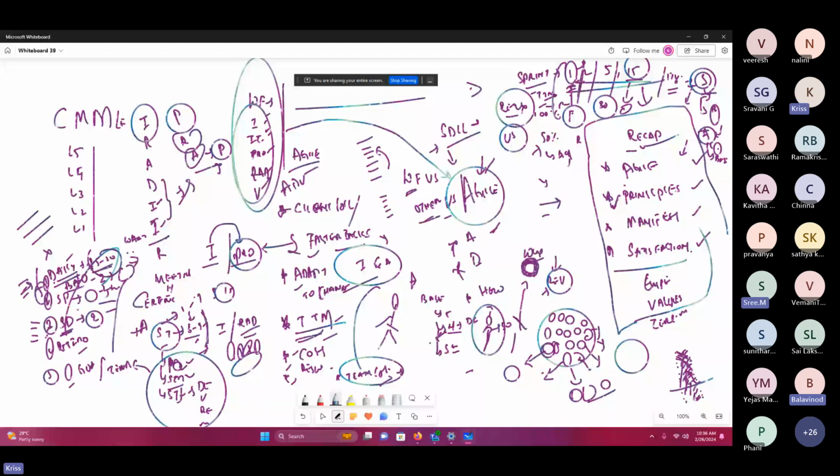Internally, the daily ceremonies, the backlog refinements, or sprint planning cover what user stories we need to pick for this sprint, what things we need to achieve, and by when we need to complete them. These all come under sprint planning. In the sprint demonstration, we show the things which we have achieved. We do that demonstration for the entire world, where everyone can attend: the product owners, the business managers, all the cross-sprint people.